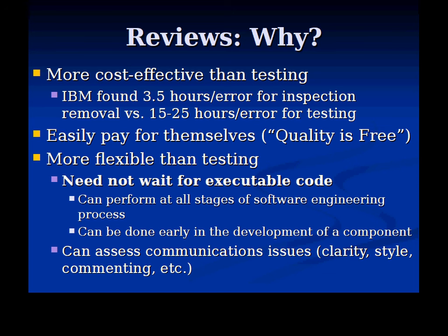Because they head off a lot of time for debugging and a lot of time for rework and fixing code. You head it off at the pass by avoiding writing code atop errors in the first place. You help lower the amount of time it takes to do the testing, to reveal the failure, and then the debugging to figure out where the fault underlying the failure lies.